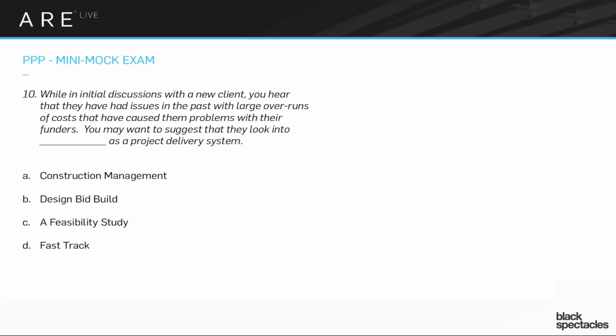Project delivery system is a term you should absolutely know. When I say design-bid-build, the architect is given the project to design this building, and then at the end of that design, you hand it out to general contractors and they bid on it. You have bidders who bid on it, and then you and the owner make a decision over which bidder is going to become the actual GC on this project. A bidder is chosen, and then it goes into the building phase. Design, bid, build. It takes a long time, but it has certain advantages. That would be a project delivery system, the way that you're going to get through the project.